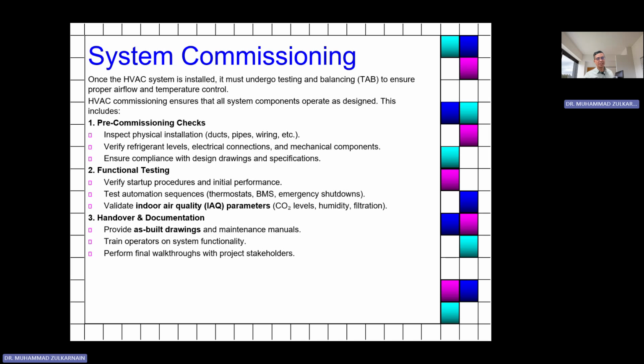We will make a checklist to check that everything is good before we hand over. If the checklist is not satisfied, it cannot be fulfilled. Functional testing, anything. Once they are all satisfied in the checklist, we hand over by signing off the project.